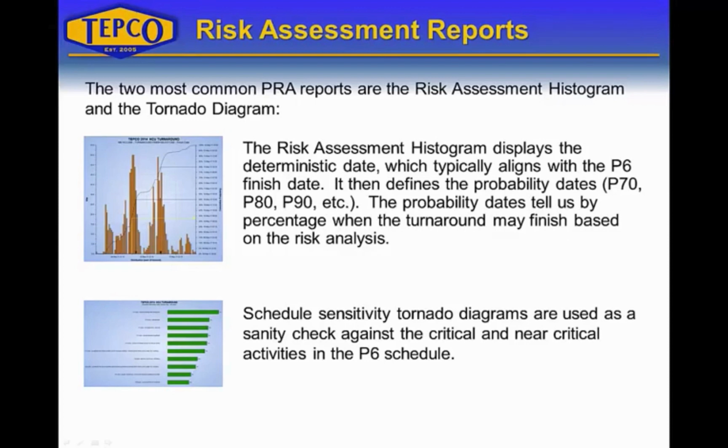You could actually identify something as critical in Primavera risk analysis that you did not see as critical in P6. So you want to do a sanity check against that. If the risk analysis is accurate, then you may need to go back to P6 and make sure that you monitor or somehow flag that particular activity or job as a possible critical driver.